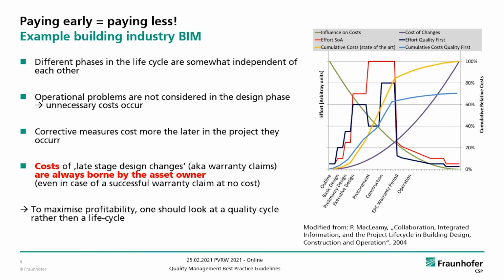The baseline graph here, which is always cited, and which in this area is something similar to the famous photovoltaic 3-generation graph, is the McLean graph, where they clearly say that the earlier in the design you implement your risk and quality controls, the cheaper the overall project will be. Initially, a quality-first approach will be a bit more expensive, especially in the outline, preliminary or basic design stage. Maybe even in the executive design stage, you pay a lot more in time and money to get that sorted.